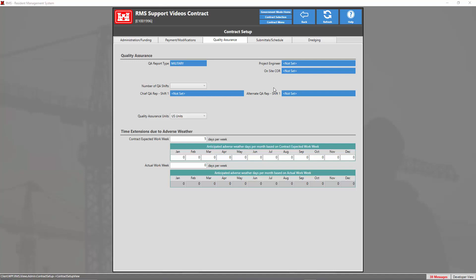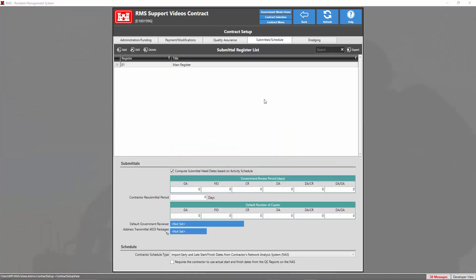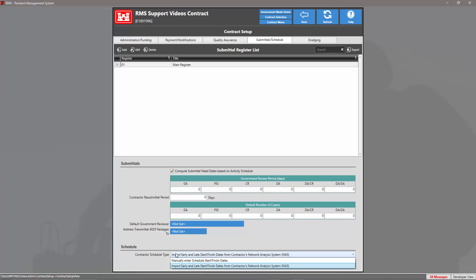Once you're done with the quality assurance tab, we're going to head to the submittal schedule tab. At the top we have our submittal register list where we can add another register to this particular contract. Down in the submittal sections we can enter the review periods for the appropriate submittal types and also the default number of copies. We can also set the default government reviewer and the address for 4025 packages. In the schedule section we can set our contractor schedule type to either import or manually enter.